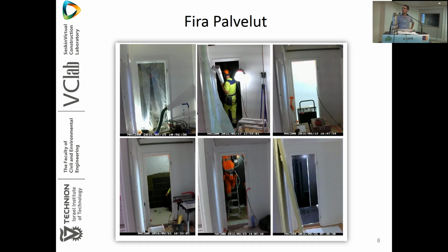Fira, with their interaction with Lean, decided to start looking at two main concepts, flow and value. And the way they started with flow is they just put up a webcam. They said, okay, let's look at one particular apartment, and let's see how long we see workers actually working there. And what they found was, over the course of the 13 weeks of lead time, from the customer moving out, because these are refurbishments, so someone is moving out and then coming back, only 18% of the time was there actually someone doing the work. So if they were to make no other improvements, but just make sure someone was constantly working in the apartment, they could drop it from 13 weeks to 20% of that. And the other element was value.